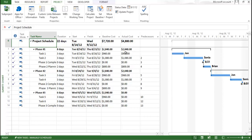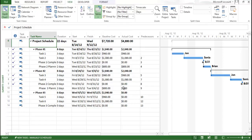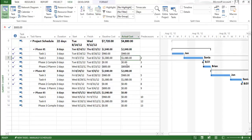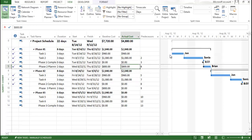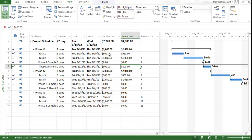When you update the project, you get to know the status as of that date — how much cost you incurred, which is the actual cost incurred on site. Now, go to the View column and click on Table to identify the earned value. You can also update cost here, but note that this cost is calculated based on the schedule. Make sure you are not going to update the baseline cost, because only then can you identify the variances and differences — the cost variances for each activity.